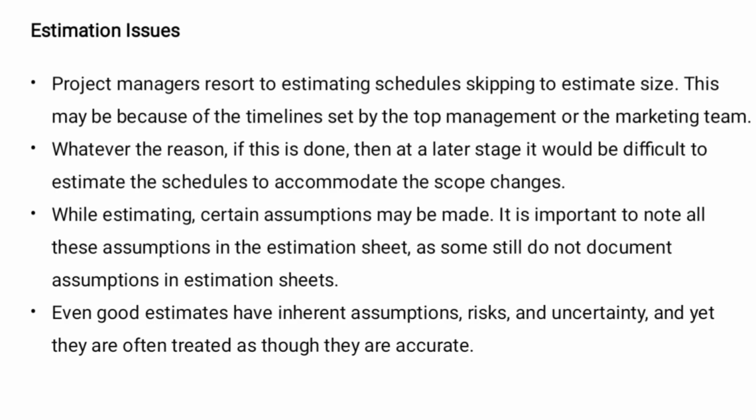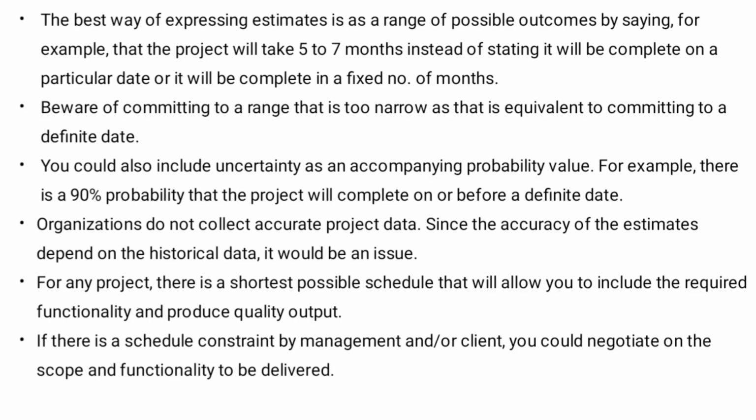Even good estimates have inherent risk and uncertainty, and yet they are often treated as though they are accurate. The best way of expressing estimates is as a range of possible outcomes.